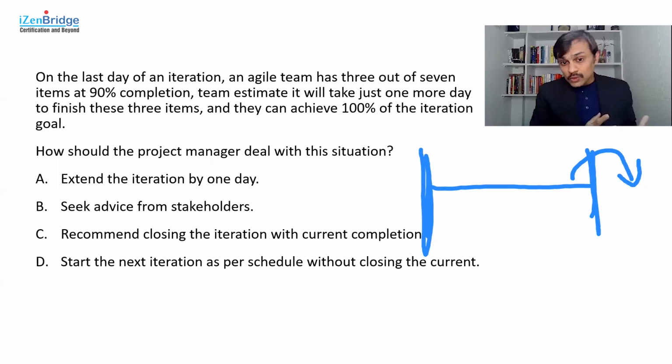So it might look like a good idea, but then I am violating the basic fundamental principle of time boxing, which recommends us to fix the time. The reason is, if you start doing it once, you might keep doing it more and more frequently, and you never know whether 1 day is needed or 2 days or 3 days.